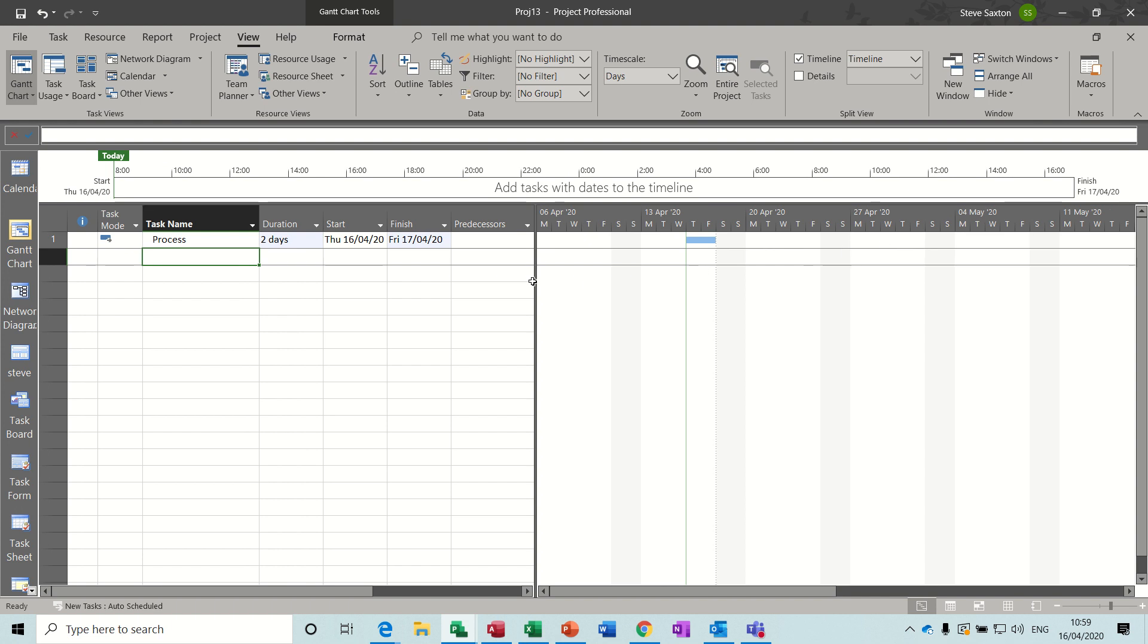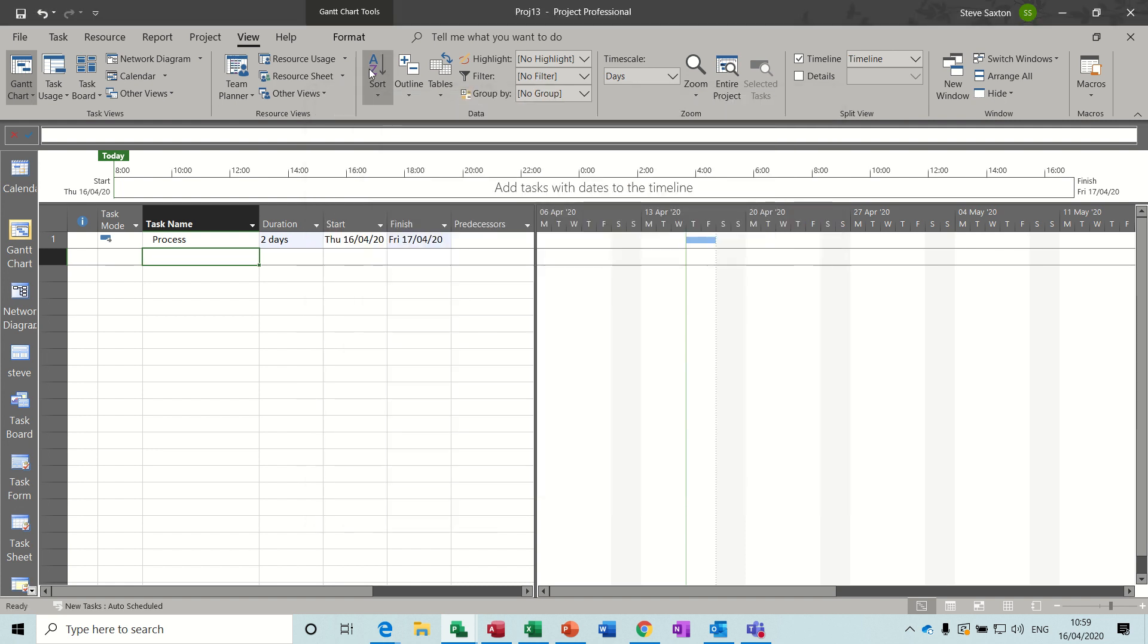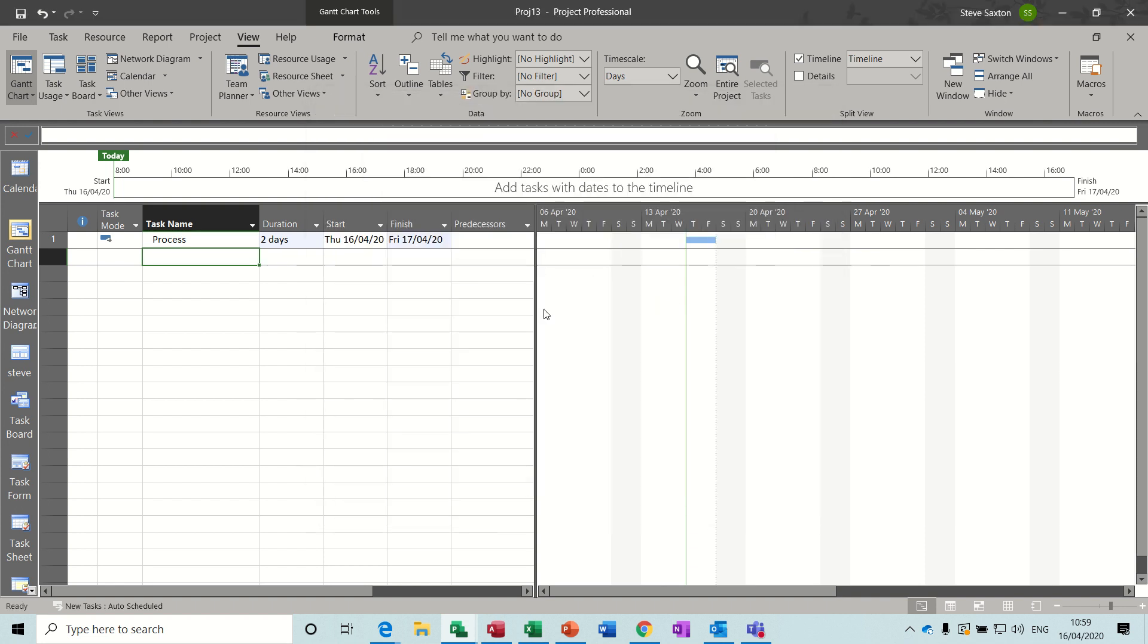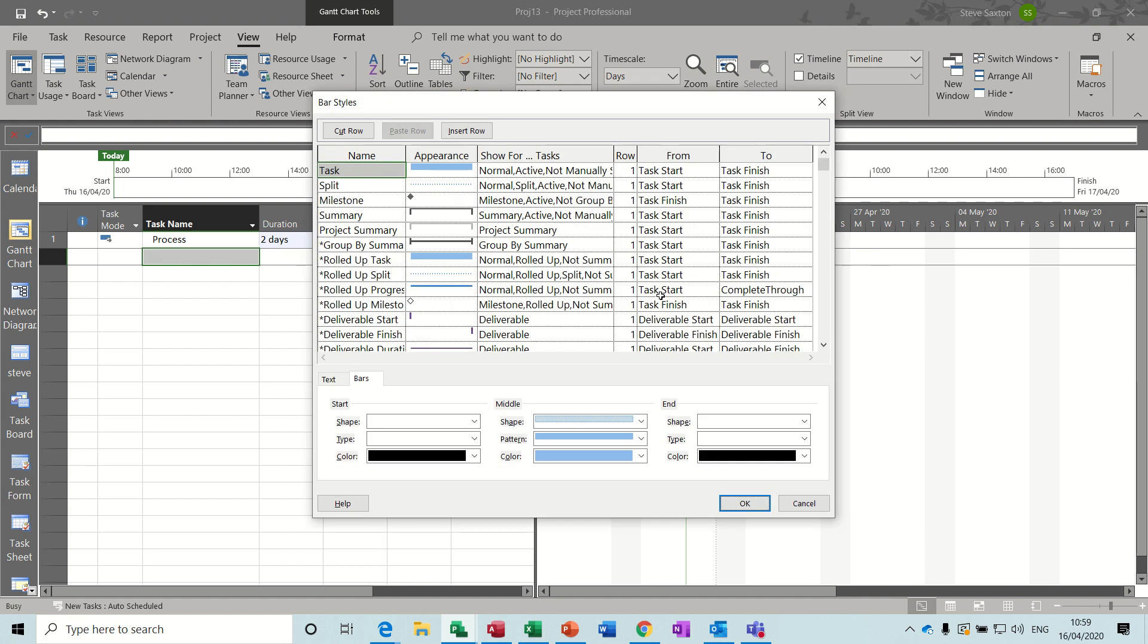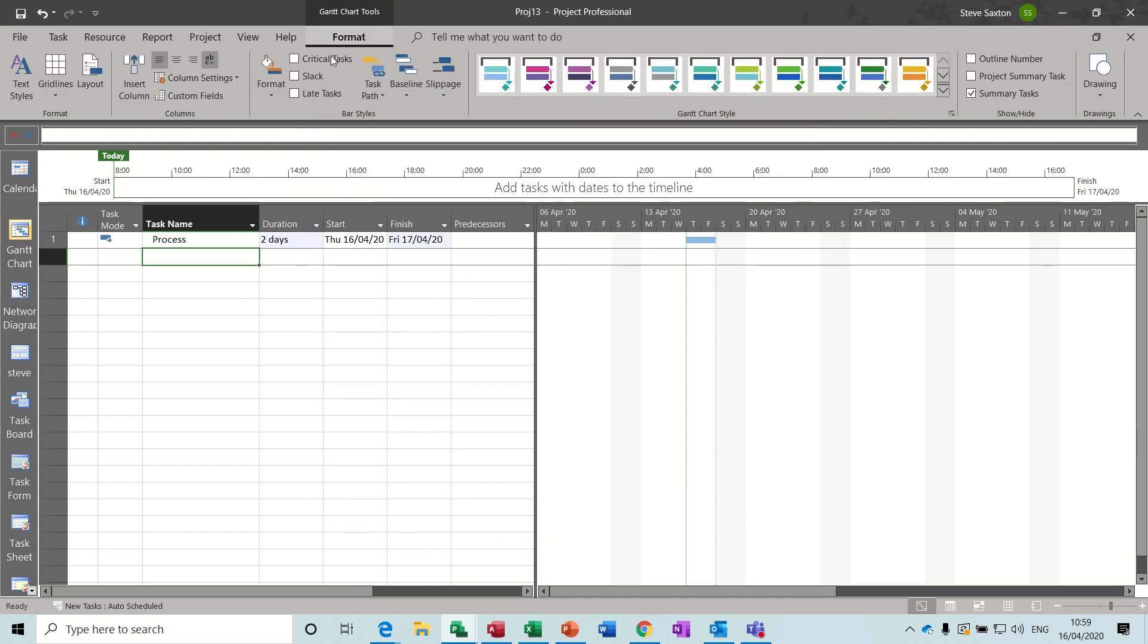What you have to do is double click on the white to get into the bar styles, or if you don't want to do that or you find that difficult, because sometimes when people were double clicking on the white it was just creating tasks, you can go Format and then Format again and get bar styles from there.